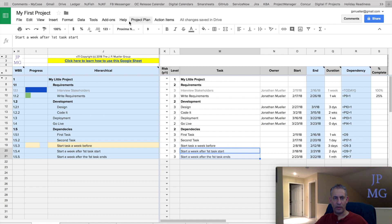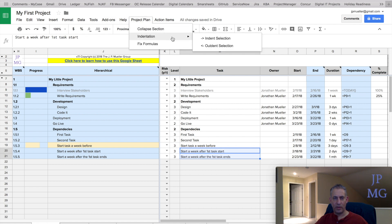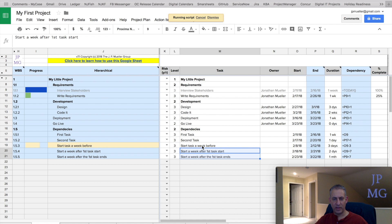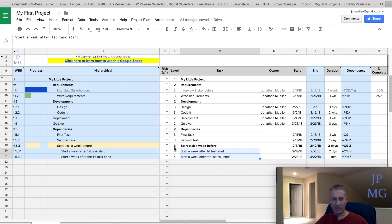And I'm going to do project plan, and I'm going to do indent the selection. And what that's going to do is increase the level by one, which essentially makes them children of this task. And notice it bolds this one.